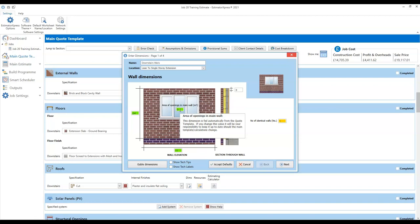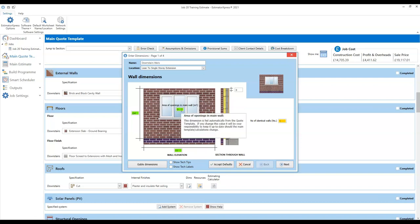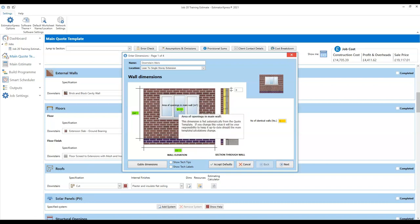The area of openings is currently set to zero because we haven't actually estimated any openings in our extension yet. When you open the extension job template, it already has some data in because it had allowed for a three by six extension, so the walls are estimated already, but it hasn't automatically put any openings in there. That's a really important thing to remember — it doesn't know if you want windows, bifolds, PVC doors or whatever. Until you estimate any openings, the template will assume there aren't any. When we work our way down the screen and estimate our bifold and window, it will then deduct those areas of openings from the wall.